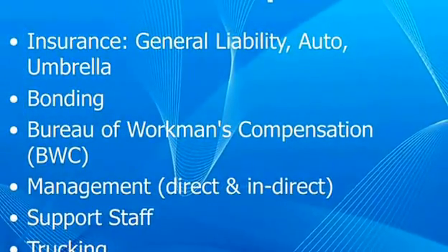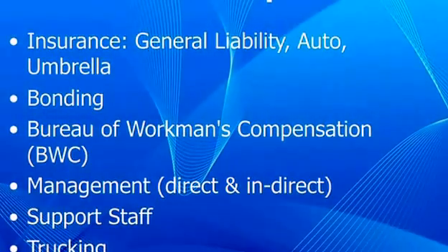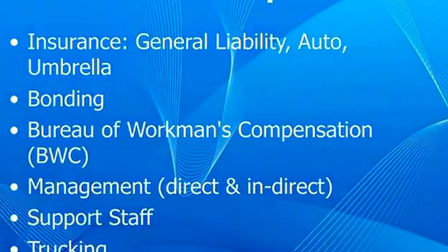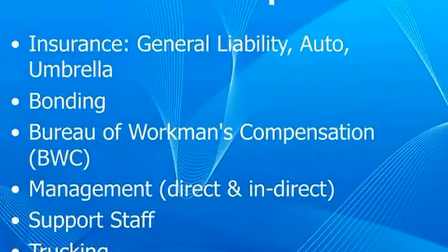We kind of touched on support staff, trucking, warehousing. Pricing right now on materials is kind of going crazy with gas. So a lot of it is, I'm bidding a job today and it might not go for 1 quarter, 2 quarters, a year, 2 years. I bid a lot of work that doesn't happen for 4 or 5 years. Sometimes it's beneficial for me to buy a job, put it in my warehouse, and beat 2 price increases.